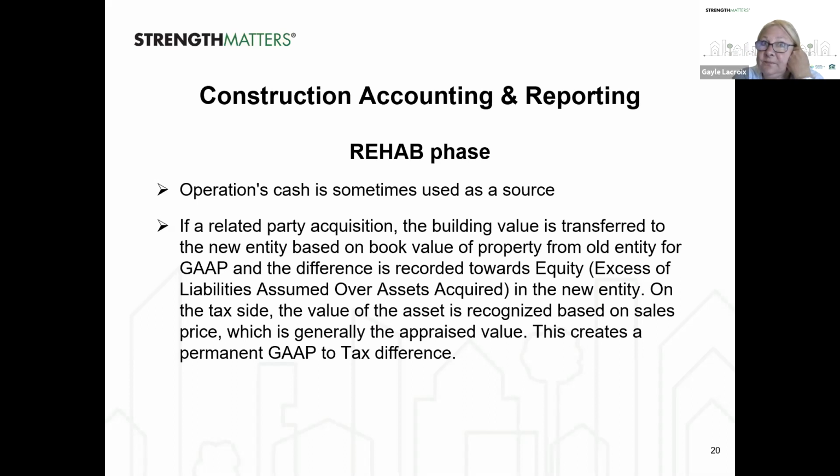Yeah, in every audit, we have to include the surplus cash calculation, as well as how the money's going to be distributed. And so you can imagine if the development team had decided that some of the operational cash flow was going to be used for development sources, and then we turn around on the first year-end audit and show that the operational cash flow is going to be distributed to the third party under the waterfall. Now we've spent the same dollar twice, and that's when you run out of cash. So instead, you would have to have a line item on your surplus cash calculation to show that this much of the operational cash flow was already earmarked for development. And that should tie to the number that's on the cost cert, because there'll be a column for each source, I should say, and one of those sources is the operational cash flow. Anyway, so that's what the first point is about.